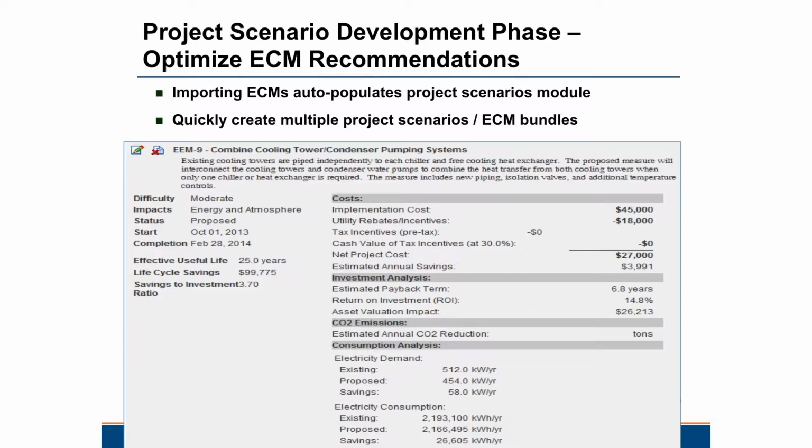So this may be draft numbers, and it depends on what stage you're in the project, but we want to get those in there because of the concept we talked about earlier, buying down the cost of the project at the measure level. You'll see in the reporting in a few minutes, we're going to want to have those utility incentives itemized on a measure level.